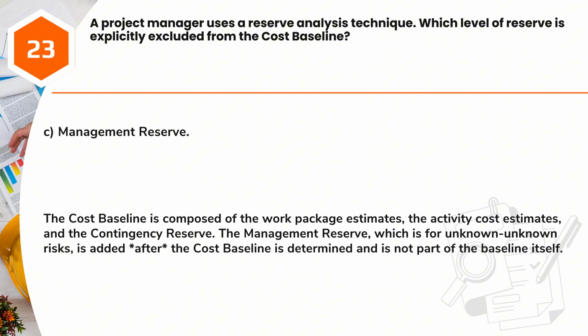Answer C. Management reserve. The cost baseline is composed of the work package estimates, the activity cost estimates, and the contingency reserve. The management reserve, which is for unknown risks, is added after the cost baseline is determined and is not part of the baseline itself.